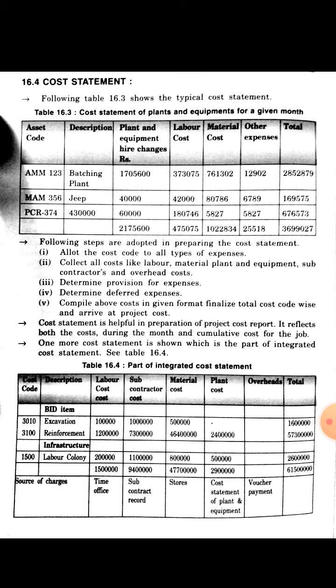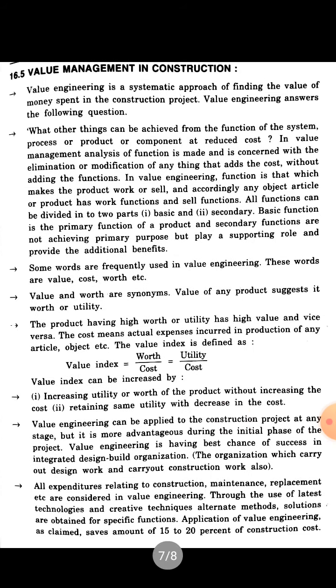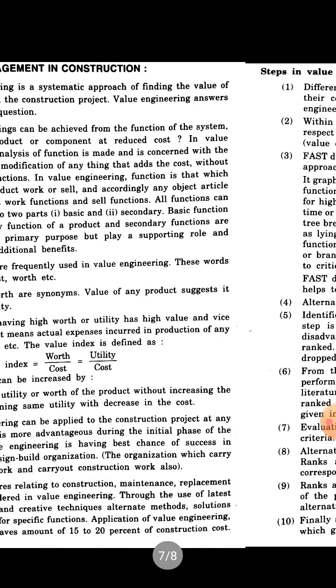The cost statement is helpful in preparing the project cost report. Another table shown is part of an integrated cost statement, which includes cost code, description, labor cost, subcontractor cost, material cost, plant and overhead charges, and total cost. The summation of all these cost components gives the total cost of the work.